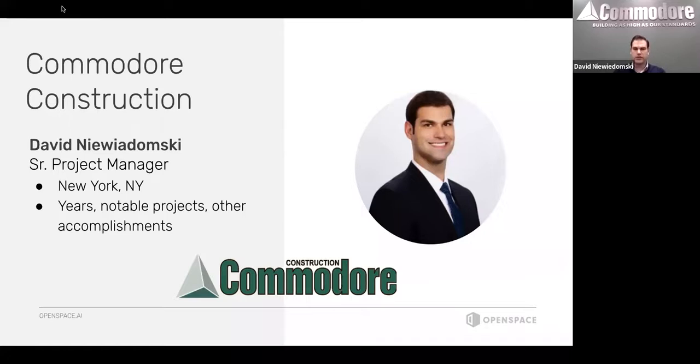Well, on the progress tracking side, I had done it manually previously on large scale hospitals. And I was probably spending anywhere between 12 and 16 hours a week just to get the quantities and what's in place, walking the job, doing manual takeoff on OST, going back, figuring out the numbers, putting it into a spreadsheet. And this is replacing all of that, those resources spent, with a simple 20 minute to an hour walk, depending on how big the job is. And then I'll say the other thing I like, we're having our foreman walk it.